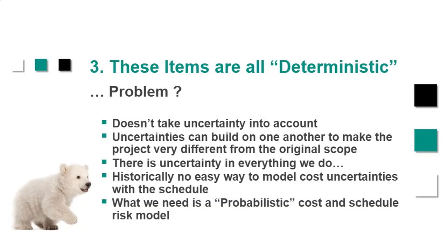In fact, there's been a case study here in Alberta, where I live, done by the Construction Owners Association of Alberta. They look at mega projects across the province, those being projects over $1 billion. And what they found is that on average, those projects are 17% over cost and 19% over schedule. So that tells us that those things are related, right?